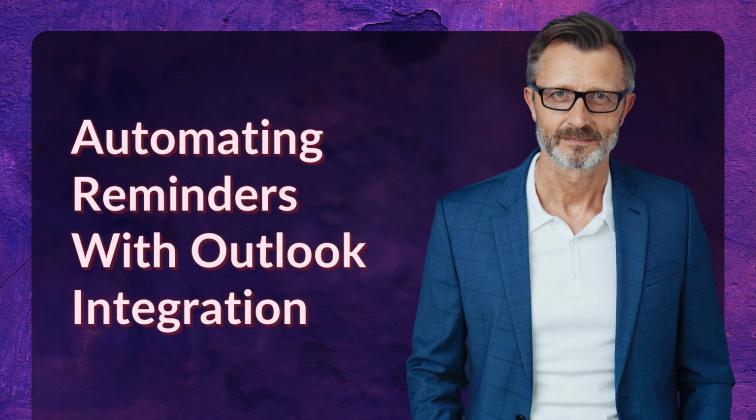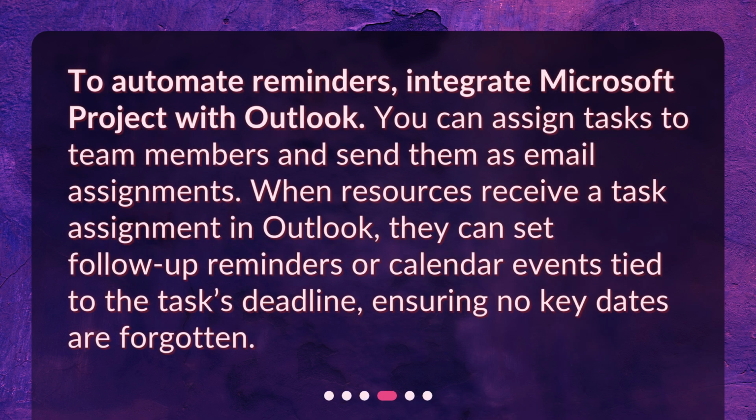Automating reminders with Outlook integration. To automate reminders, integrate Microsoft Project with Outlook. You can assign tasks to team members and send them as email assignments. When resources receive a task assignment in Outlook, they can set follow-up reminders or calendar events tied to the task's deadline, ensuring no key dates are forgotten.